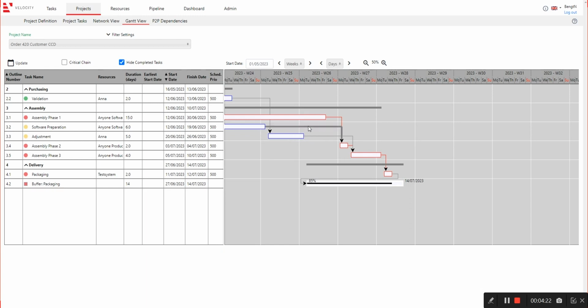So what we do is calculate where the project would finish if these were in control. We subtract the slack, and what happens is that we end up in the yellow zone, so these will be yellow. And for this one, if we subtract all the slack it has, both this slack and this slack, then we would end up in the green zone.